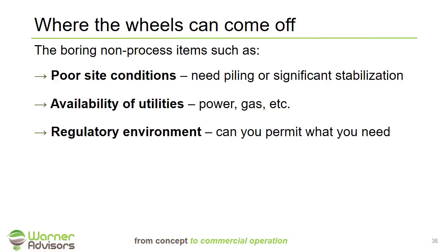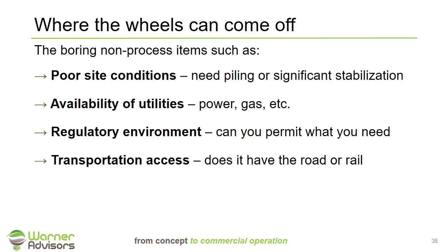The regulatory environment. What permits will you need and how easy is it going to be to get them? This is something that you need to seek some permitting advice early in the process and get a good assessment of what's the likelihood that you'll be able to permit your facility and make sure there's not going to be any onerous conditions that will keep you from running that plant cost effectively.